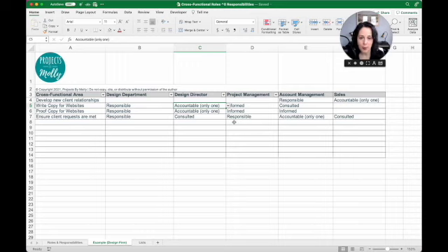The accountable, that is the person to whom you go when you need to escalate, or if something goes wrong and you need some help to resolve an issue. There is typically a best practice is that there's only one A or accountable person within a particular team. Now, I know in the real world that sometimes gets a little murky, but from a best practice perspective, we would recommend having only one person or group be accountable per task or line item here.